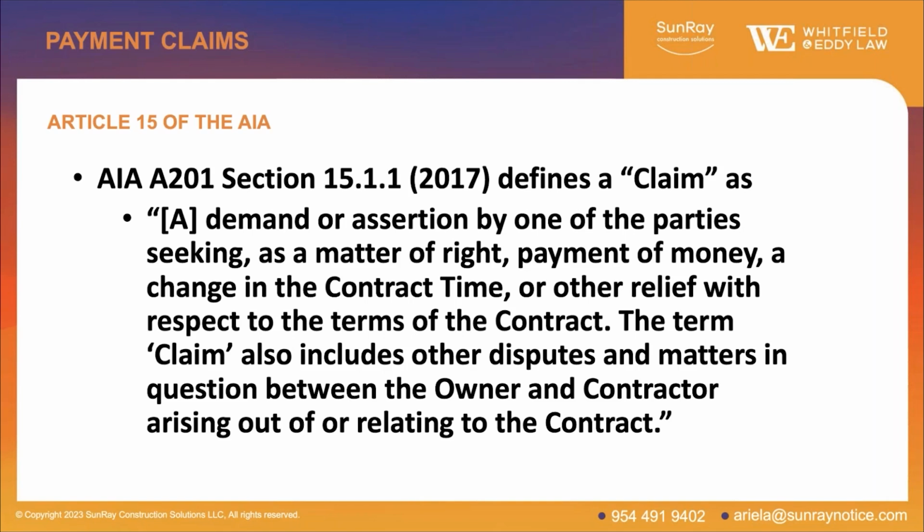So again, I'm going to go to the AIA document A201, Article 15, and specifically section 15.1.1, and it defines a claim, capitalized Claim. So you see that there, and the important takeaway from this is a claim is not only a demand or assertion for extra money, but also extra time.